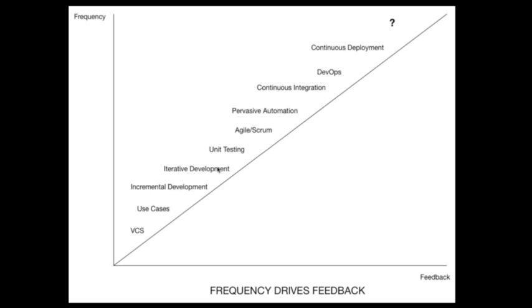A lot of people try to do Scrum and Agile development, but they just try to do incremental development. They try to get everything right the first time, and they don't actually embrace the iterative side of things. So, one thing that I think is important is that iterative process. And that's embracing the fact that you are going to redo a portion of your project. If you're redoing too much of it, then there's a broken step there, and you can look into that further.